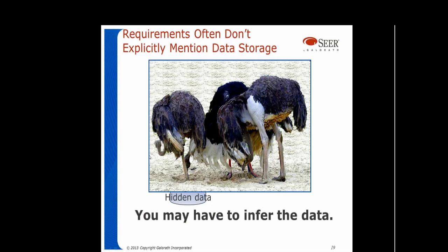As I mentioned, you don't necessarily know about that data structure beforehand. And in much function point counting, you're not provided with that level of detail that maybe comes in at the architectural design level or further, and so data structures are not specified. If you only know the functionality of a piece of software, you're going to have to infer that data. That happens frequently. You're going to have to figure out, oh, there's a work breakdown structure that is relied on, or there's some other sort of logical data source that's relied on.